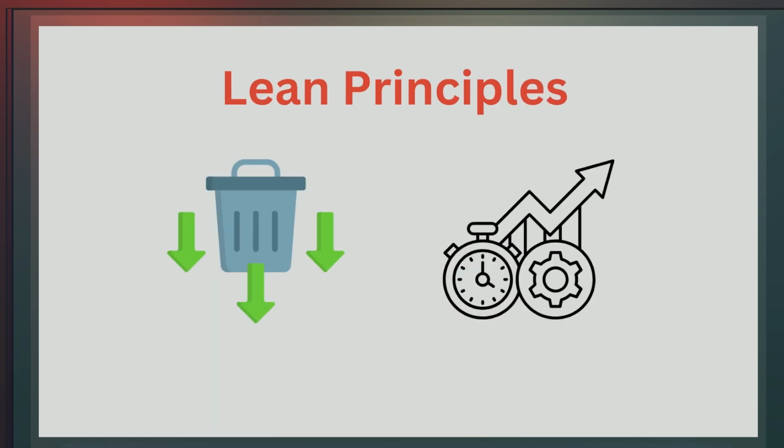Now then, if the project manager was following lean principles, they would see this Friday as not needed for the coding pixel artist and might try to make the next project a 4-day work week to save resources. Whilst lean principles are about saving resources, it's also about process improvement.